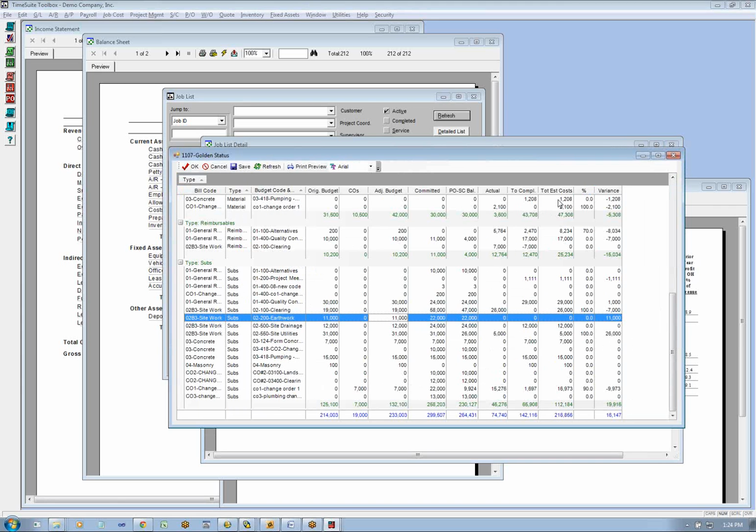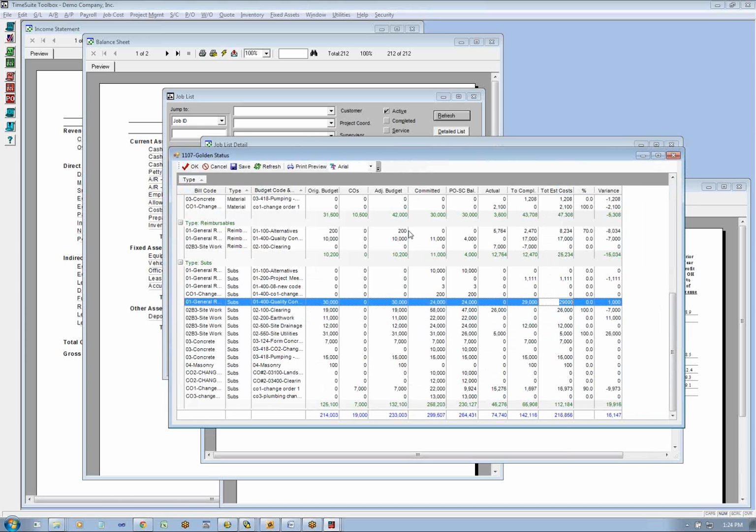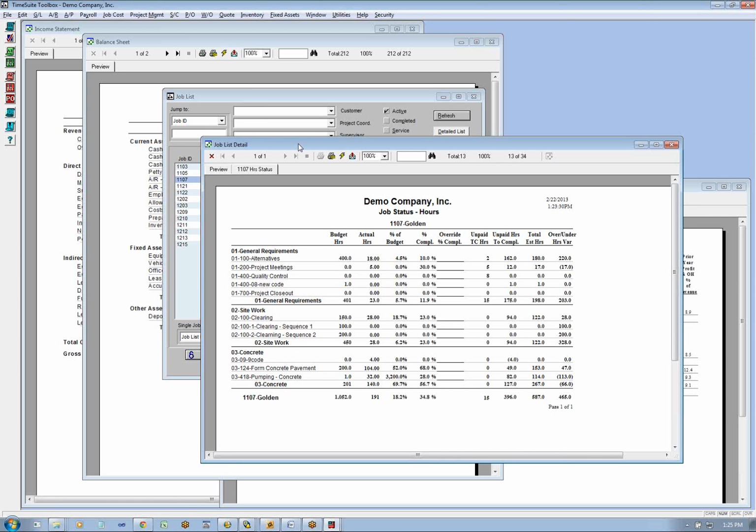Instead, you should be doing this job status, which is just in addition to your budget, an additional number beyond the revised budget that you're changing. We just did a feature where we're providing an audit trail on this too, by the way, for who makes those changes and when they're changed. So we do have an audit trail on changes to your job status.